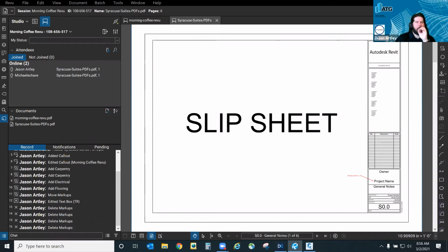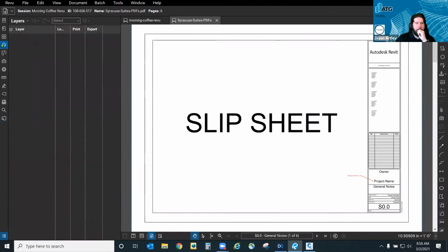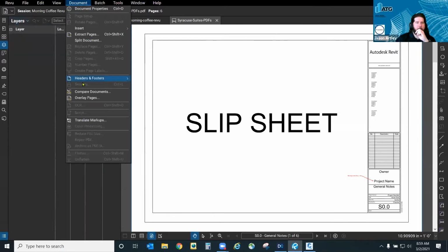This is a great opportunity to use layers inside of Review. If you go to layers, you can create a layer based on those options. So if you want to do a 35% layer where all of your 35% markups are there, you can do that, and then you'll create another layer for your 65%. However, those documents can be saved, and you can use the overlay function to overlay your 35 over your 65 or vice versa, and it will show you what's different about them.